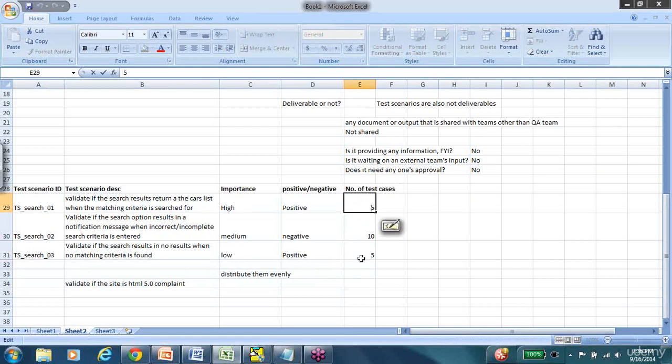because when you actually get down to the actual work itself, there are a lot more things that you would want to test that probably will not come into your mind when you're reading the FRD document. So always there is a lot more work than we anticipate. So in the interest of time, in the interest of being able to do everything, overestimate but not underestimate. So that's something that will work. So if you are thinking there might be roughly, for testing negative search scenarios, if you feel like there are 10, write 20, because chances are you might really do that.